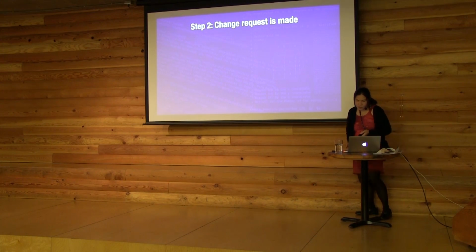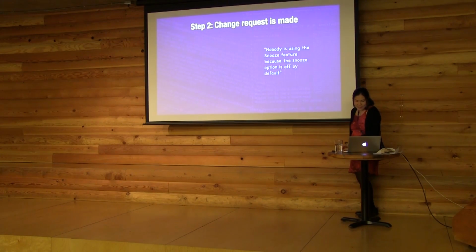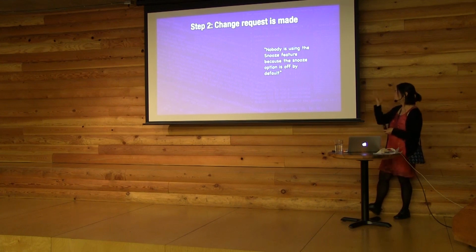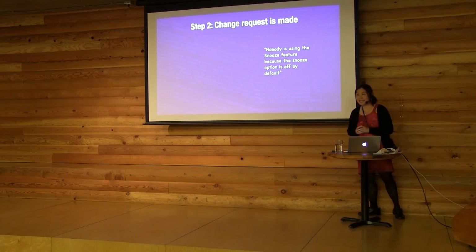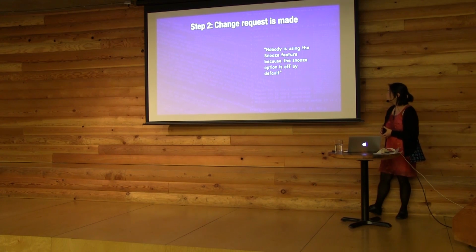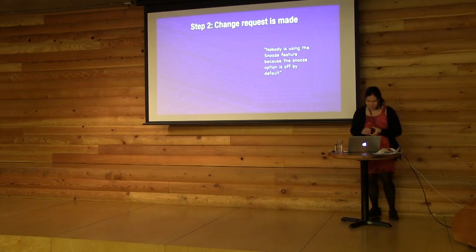So what I like is a formal process for making a change request. Here, for example, the designer has said that a certain option should be off by default. Usability testing is finding that people are not finding the feature because it's off by default.